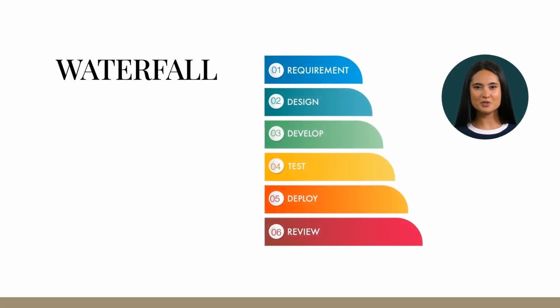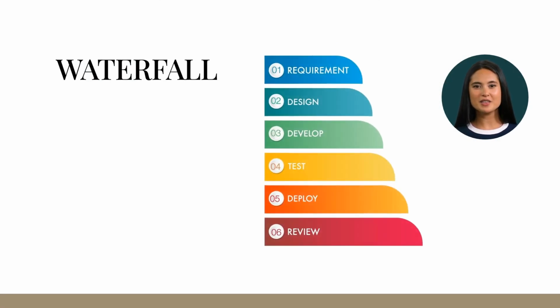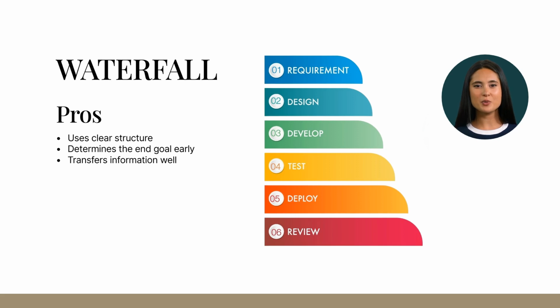Let's look at the pros of the Waterfall methodology. Uses clear structure. When compared with other methodologies, Waterfall focuses most on a clear, defined set of steps. Its structure is simple. Each project goes through these steps. 1. Requirement gathering and documentation. 2. System design. 3. Implementation. 4. Testing. 5. Deployment. 6.